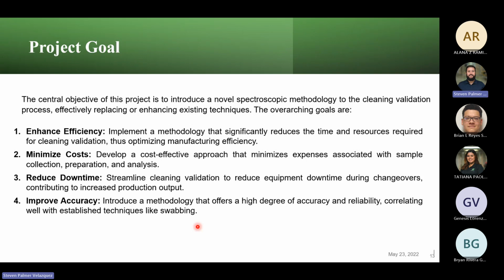Here is where you express what you expect your project to accomplish, but with measurable, very important, it has to be measurable. If it is immeasurable, you're not doing a correct project charter. You can be lacking on all of this, but if you have measurable goals, it's a real project. Because you're saying there's a metric that can define your success. The project goal is the most important part of the project charter. And this is very useful for creating proposals or writing project metrics or updates.